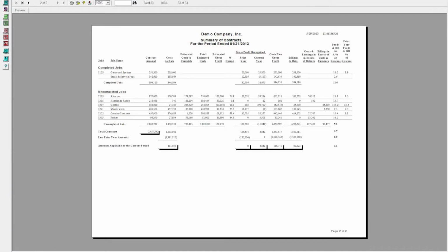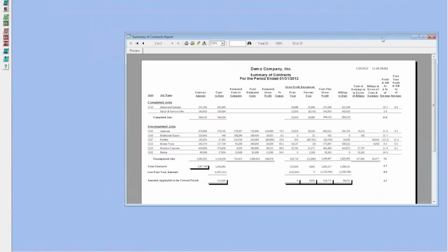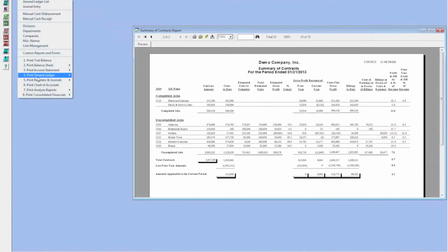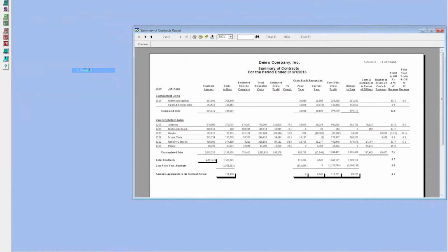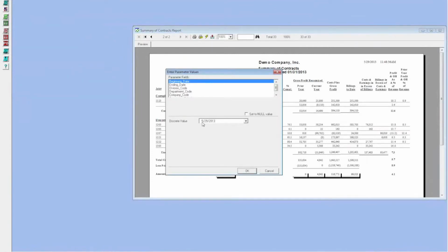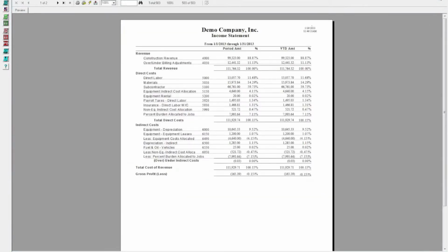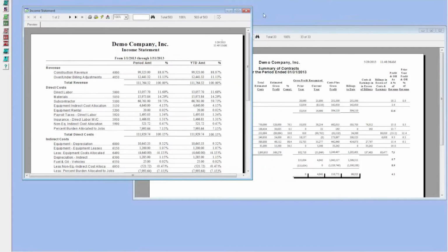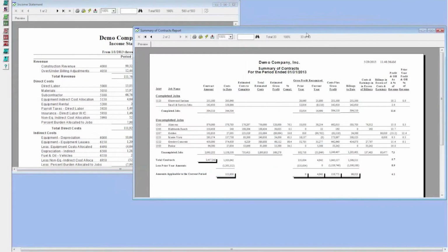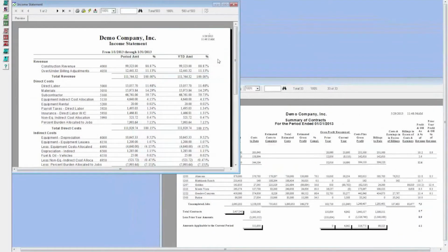your income statement. Tying into the income statement is crucial if you want to prove your costs and present a much broader picture of what's going on. By doing an uncompleted job schedule and not tying into your income statement, you're presenting a limited picture of what's going on. Your over under billings might be perfect and everything might be fine, but what the bonding companies and users of construction financial statements want is to see the cost tie in here, and the revenue tie in here. And this will tie in if we accrue our over under billings.